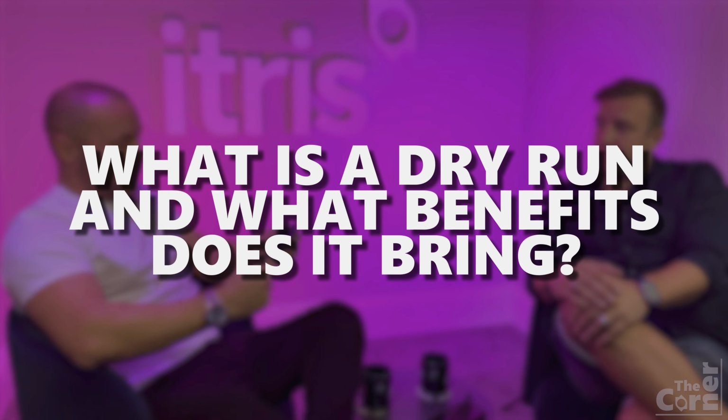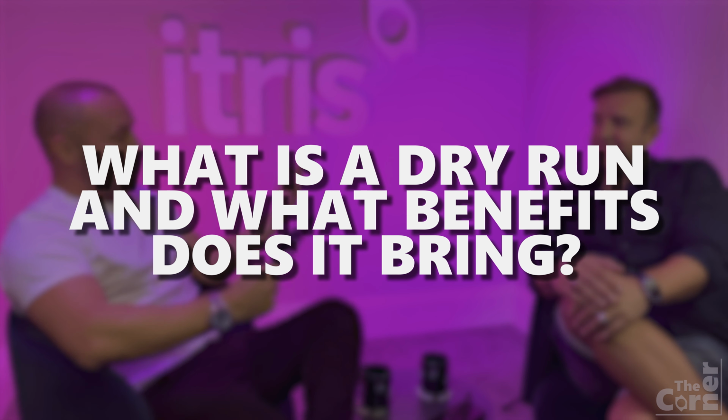So Rob, we offer all of our customers a dry run. Now, assuming that's not a jog around the park in the peak of summer, can you tell us what this is and the benefits that it brings to the customer and its key stakeholders? So dry run, basically, we'll get a copy of their data and other processes that we may well have put in place, like they need to get new machines in, that kind of thing. But ultimately, the biggest part of it is taking a copy of their data, migrating it into ITRIS 9 infrastructure, and providing them with a database as outlined in the project.